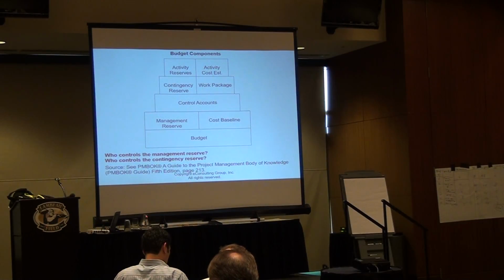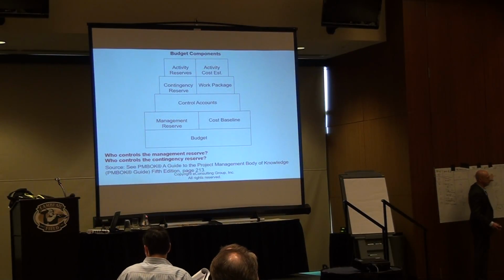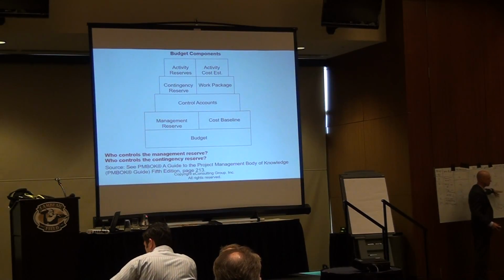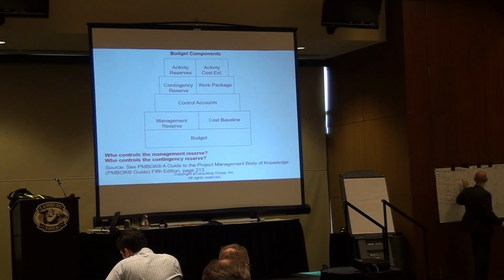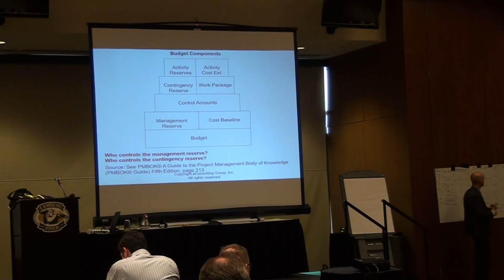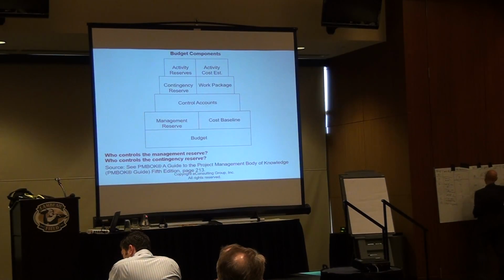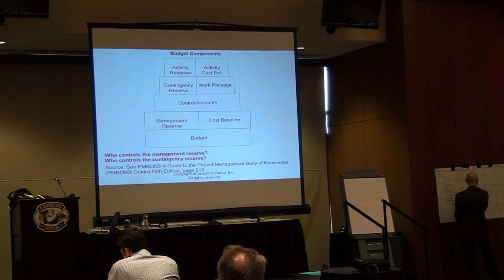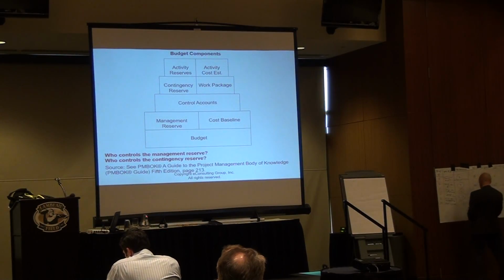Same concept here that we calculated for duration: risk buffer, contingency reserve or buffer. I also call it buffer time. Buffers, we can use to calculate the budget or expected value in terms of money. 20% of 10,000 is 2,000. 40% of 5,000 is 2,000. 60% of 5,000 is 3,000. And 80% of 10,000 is 8,000, and 50% of 10,000 is 5,000. You sum this up, that's 22,000.